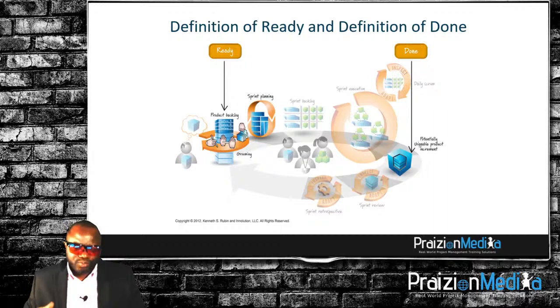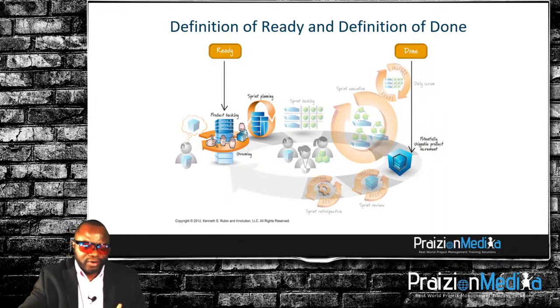The definition of ready is pretty much along the lines of the INVEST acronym. And I'm just going to write down the INVEST acronym real quick here. INVEST means the story is independent, it's negotiable, it's valuable or vertical in value, it's estimable, it's small enough to fit within a sprint, and it's testable.